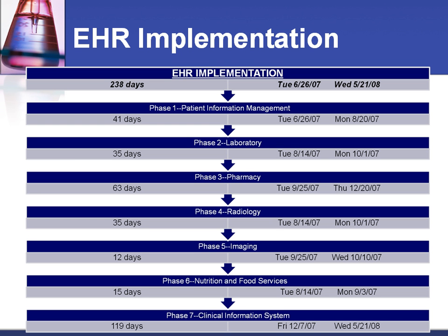A hospital-wide implementation of an electronic health record, or EHR, is multiphasic. Sequential phases are dependent upon completion of prior tasks. In some instances, entire phases of the project must also be completed before the next phase can begin. In general, completion of each subtask of the project consists of two phases, configuration and then training.